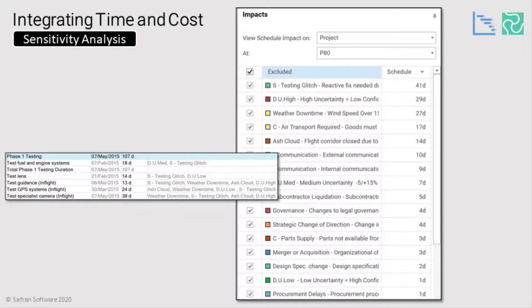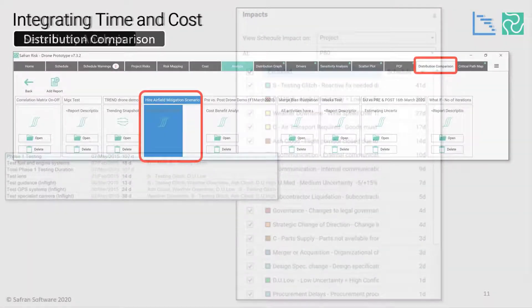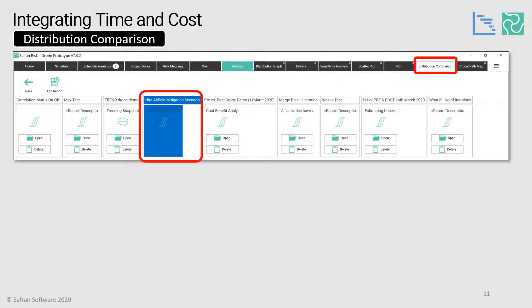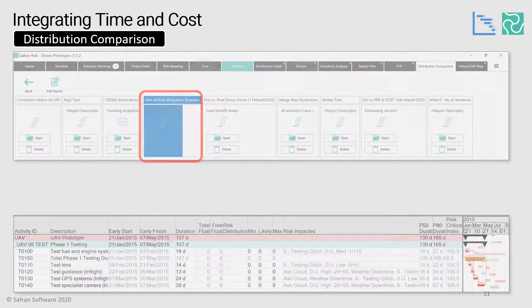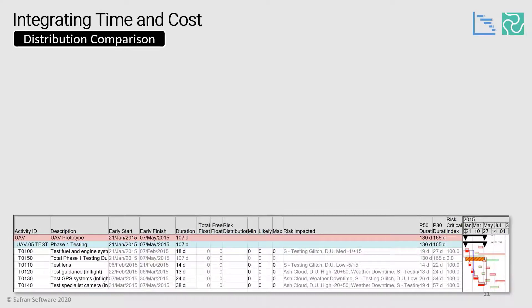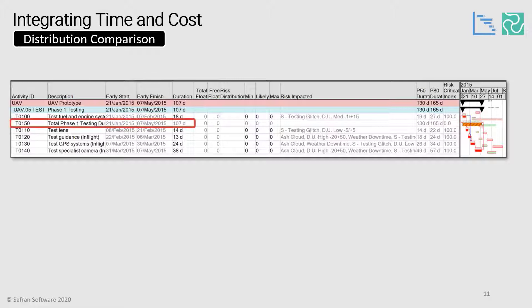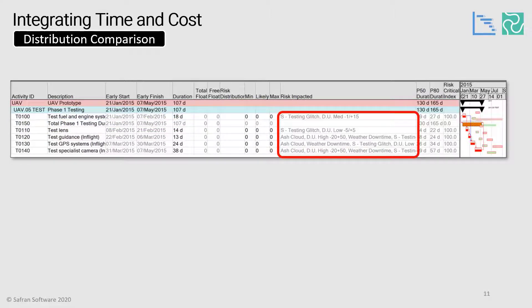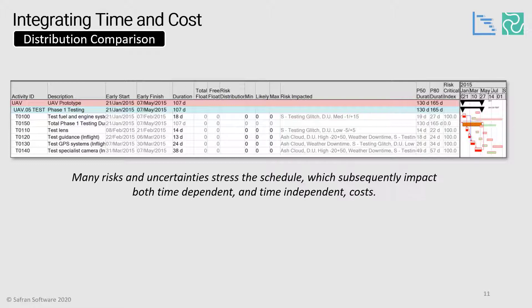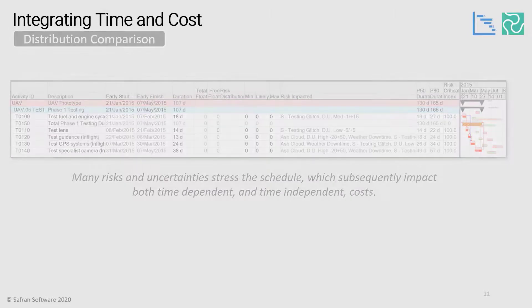So what we can do is create a scenario report within the distribution comparison, which are all saved inside Safran Risks database. The testing phase of the project centers around hiring a disused airfield so we can test fly our drones. Here you can see the testing phase of the project summarized as a hammock of activities, which is 107 days long, and the child elements have all these risks mapped to them. So we have multiple risks and uncertainties stressing the schedule, which subsequently impact both time dependent and time independent costs.